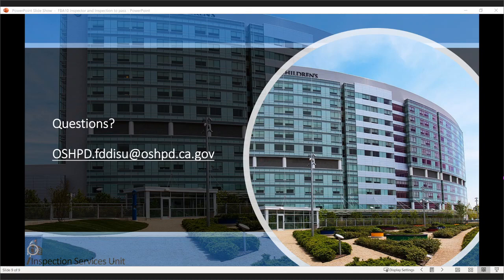But if you're doing something over and over again, I would have that mocked up. The cost should be minimal on these things. The tradesman should be able to put these together very quickly, and the information gleaned from it is invaluable. You always point back to that mock-up and say, I want that. If I can get that, you'll get approvals all day long. You don't give me that, we're not moving.